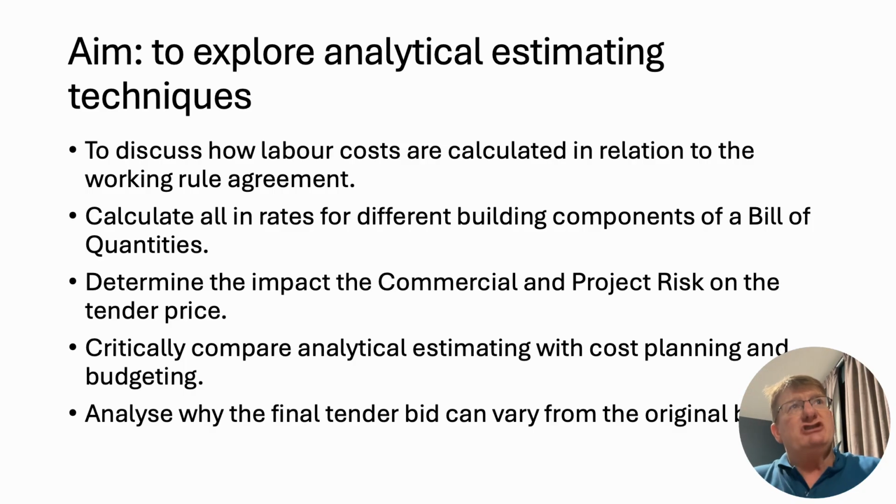So the person who's in charge of that operation, the ganger or the lead operative, if you like, is going to get paid more because they're in charge of the operation. They're going to say to the other labourers, or operatives as I should call them, where they need to place the concrete. And they're going to control everything with a shovel and with the sort of poker vibrator. So they're the things that you need to decide. And that's what we mean by analytical estimating techniques.